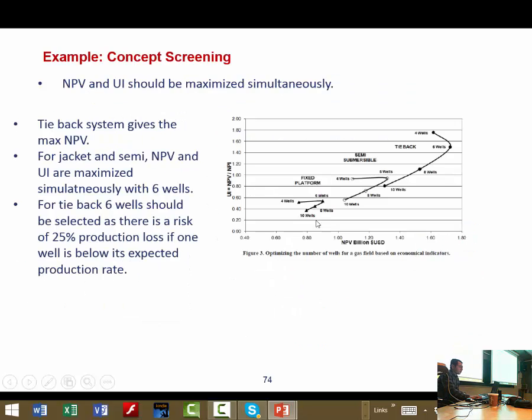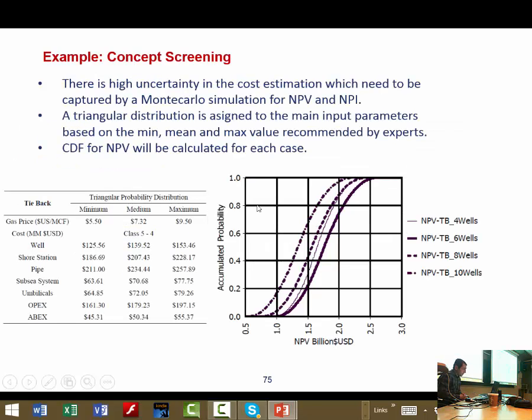But here, this is a rough estimation, and you need to make a stochastic analysis and evaluate which solution is more reliable. So the formulation is like that. Why is your cost not accurate? Because you don't know the exact value and you have a range of values. For each cost price, you have one minimum number, one maximum number, and one medium value.